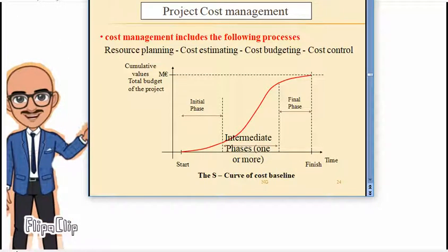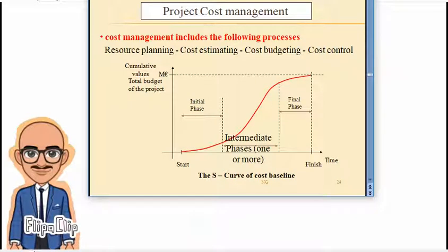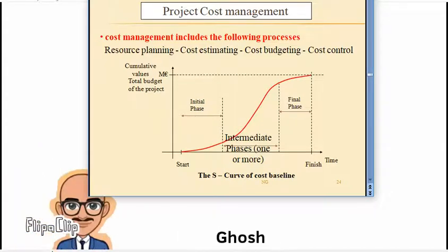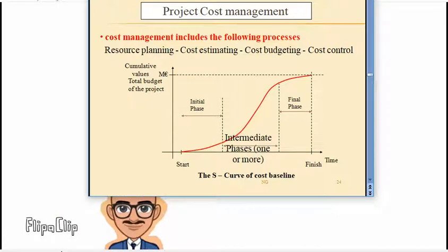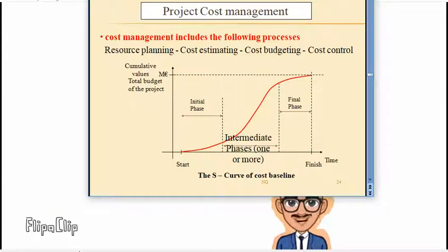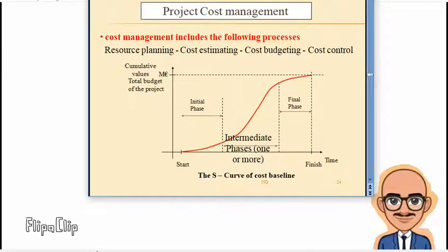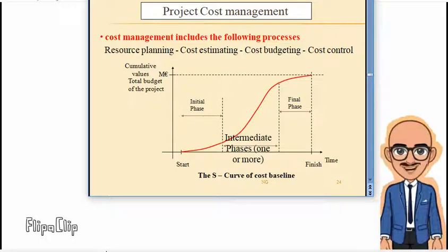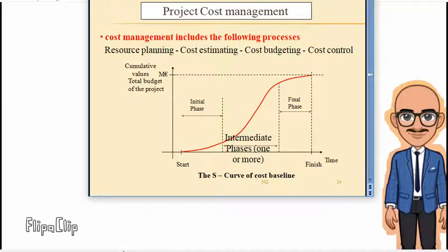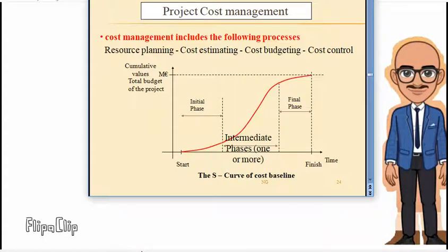In the initial phase, there is not much cost, because most of the effort goes into planning and organizing the project. So the cost is less. Then when the basic implementation, buying raw materials, and certain resource acquisitions are done, the cost becomes a little higher.